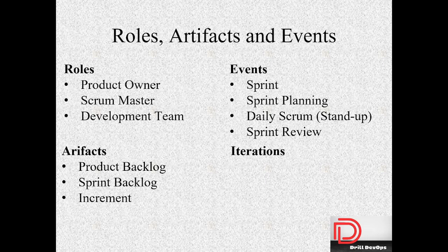And sprint planning is a meeting held between the development teams, whoever is involved, like QA team, dev team, DevOps team. Each individual team talks about the assignments they have done in the previous sprint, and they plan for the next sprint, like what they are going to take for the next sprint. They will plan what each team should take, and they are going to divide the tasks from the product backlog. Sprint planning is a meeting held at the beginning of each sprint, where the team selects items from the product backlog and defines what is to be done during the sprint, or during the course of two weeks if the sprint is spanning 2 weeks. That is what sprint planning does.